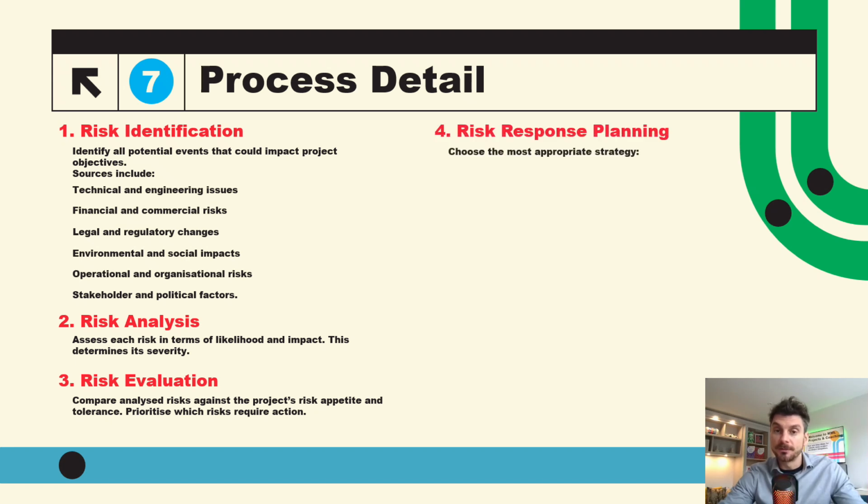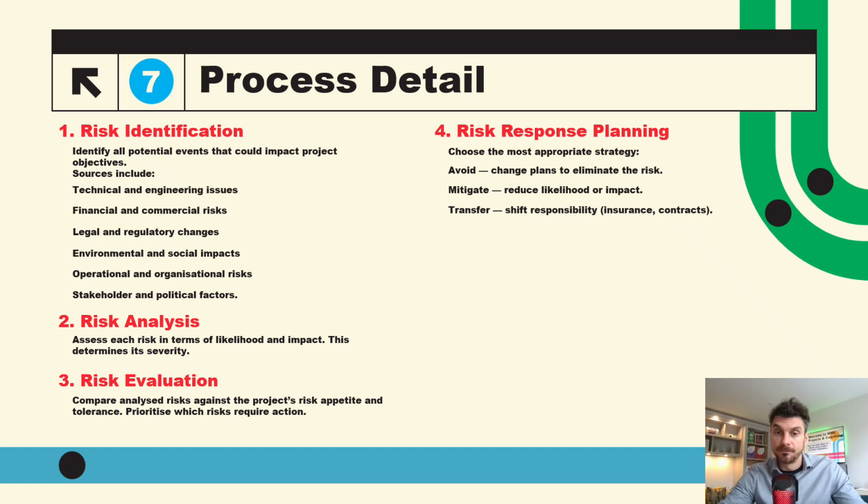Risk response planning. So choose the most appropriate strategy. Avoid, so change the plan to eliminate the risk. Mitigate, reduce likelihood or impact. Transfer, so shift the responsibility via insurance or contracts.